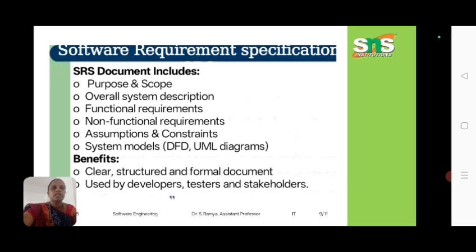as well as traceable. The purpose of SRS is that it serves as a primary reference for the requirements, development, testing, validation and maintenance. It acts as a basis for contract, cost, schedule estimates and acceptance criteria, and ensures all the parties understand the same expectations. It supports traceability. Key characteristics of good requirements: correct, unambiguous, complete, consistent, verifiable, traceable, necessary and prioritized. The set of requirements should also be modular, feasible and modifiable.